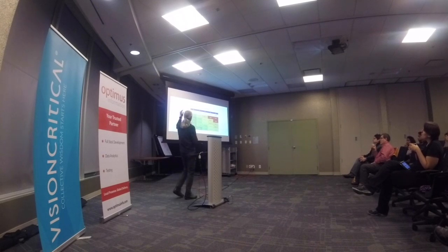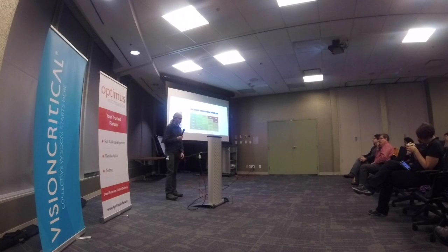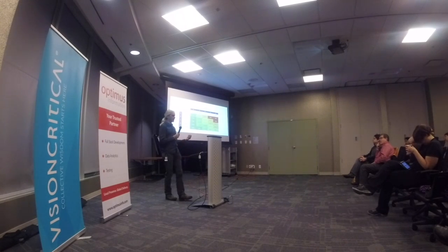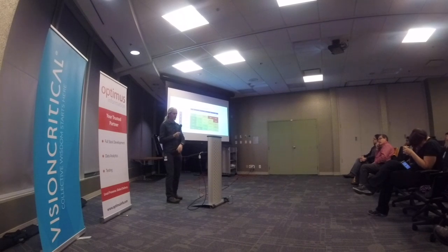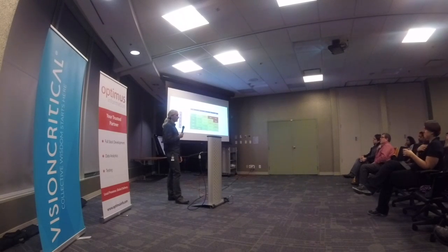And then the y-axis, if you like, is the likelihood. Right? So it's like very unlikely. It's not going to happen. Not going to see that risk. It's not going to turn up in reality because it really needs a particular customer, like a snowflake customer doing this really weird thing, this really dark corner of the product that we don't often use, and it's used once a year. All the way up to this is an everyday part of the product, and someone's going to hit this all the time, or all of our customers are going to hit this because it's in that critical path. Make sense?